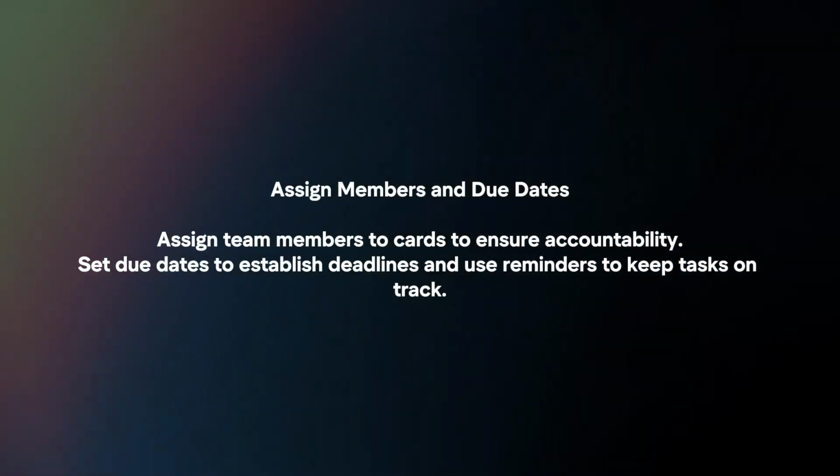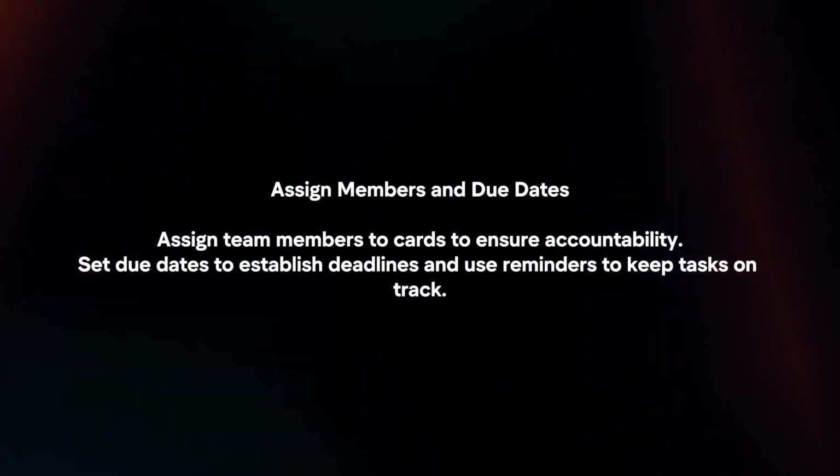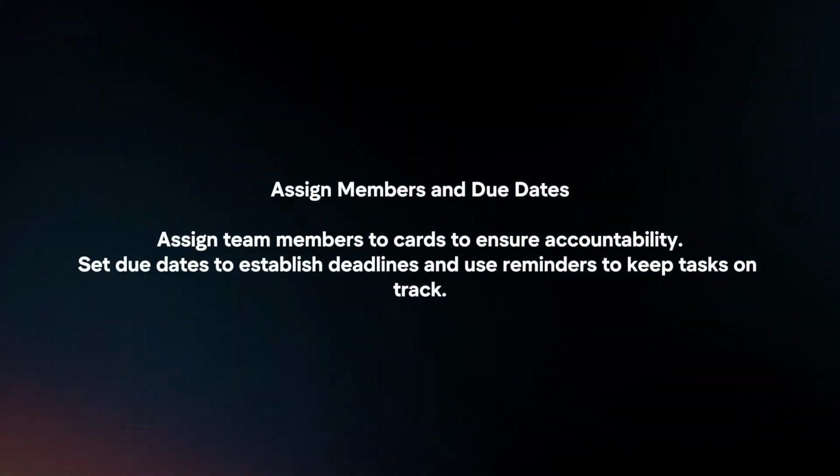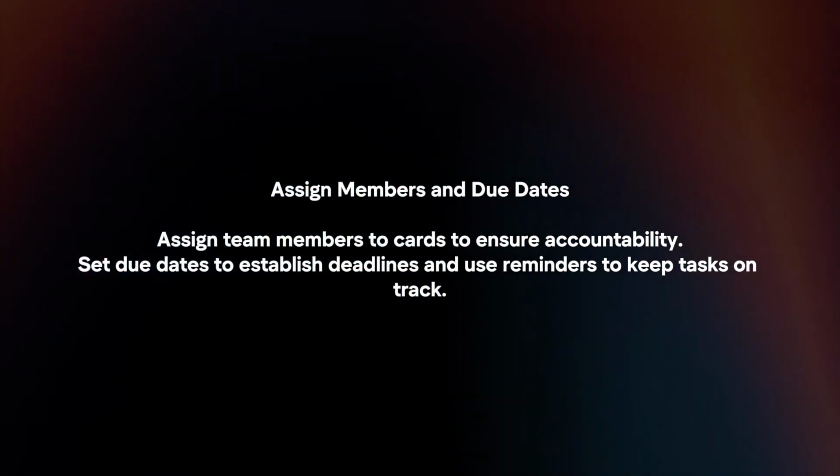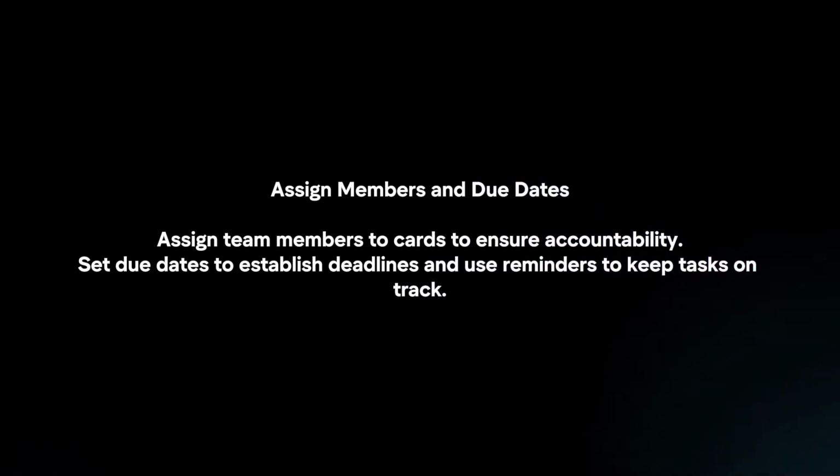Assign members and due dates. Assign team members to cards to ensure accountability. Set due dates to establish deadlines and use reminders to keep tasks on track.